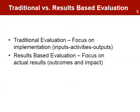Results-based evaluation focuses on assessing whether and how results are being achieved over time. The evaluation also allows the project to identify and make adjustments to the project plans, the results change, and implementation process. This is the flexibility that RBM incorporates in the design of the project.